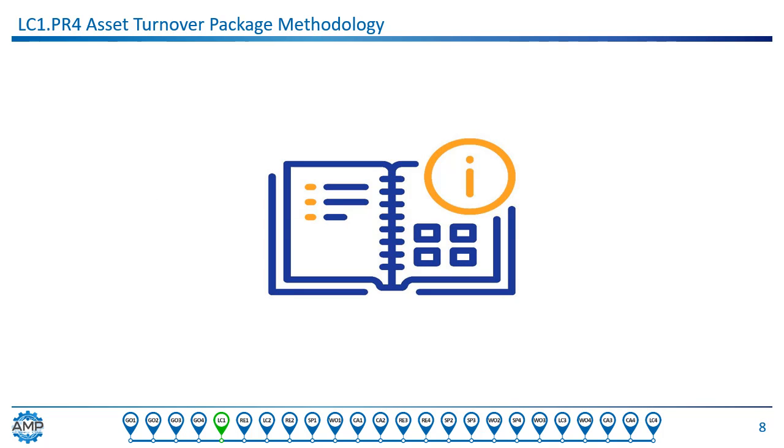Sounds like these acquisition projects have a lot of decision points and information flow, doesn't it? Well, it really is a lot if it's done right. And if all that information isn't organized someplace, it's useless for the purposes of asset management. The repository for the asset information is called the turnover package. Turnover packages provide single point of contact reference materials for development of asset care strategies.